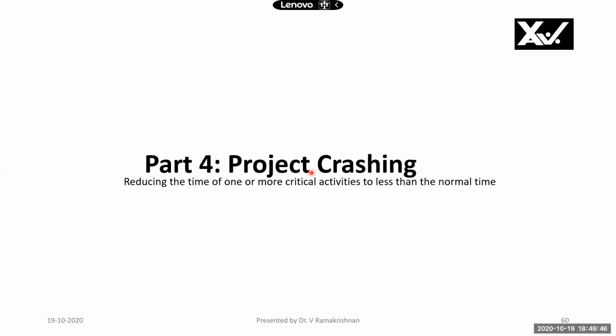How will we do it? We will do it by reducing the time of one or more critical activities to less than the normal time. Please note that whatever activities there are in the critical path, we will try to reduce the duration of these activities. We will see it with a case study here.